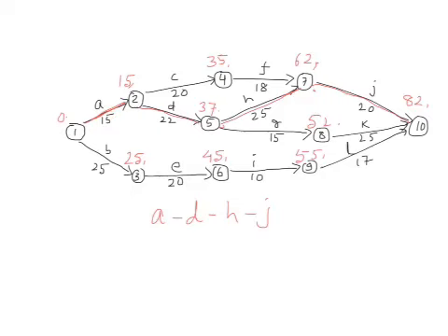Normally any delay on a critical path activity will delay the project completion, while for other activities not on the critical path, some delay is permissible. It will not delay the project completion time, but if the delay is beyond a certain level, then it will cause problems. So we will have to check how much delay is permissible. So here A is the more serious problem.